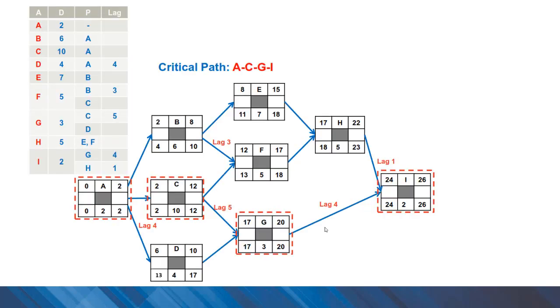Here is an example of a network with lags. As you can see, activity A is completed at the end of the second day, and then there is a lag of 4, so we can start activity B at the next day. The completion time for the project is 26 days, and I encourage you to check the calculations in the forward pass and backward pass in this project.